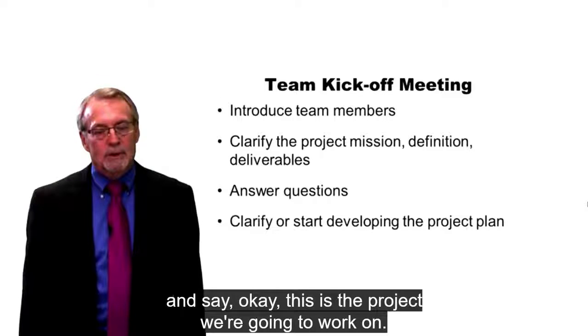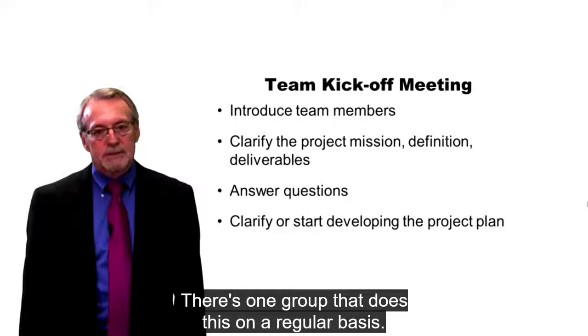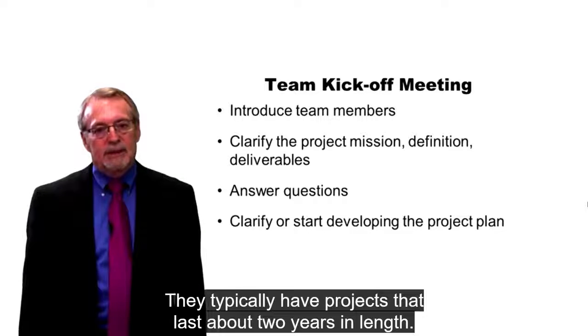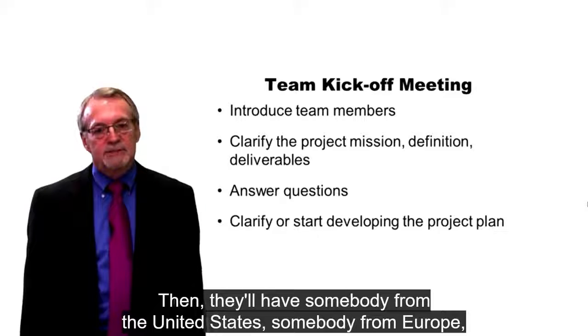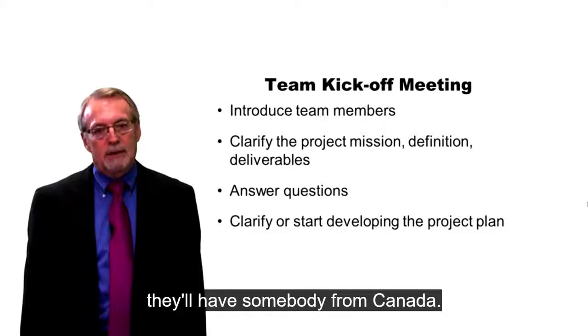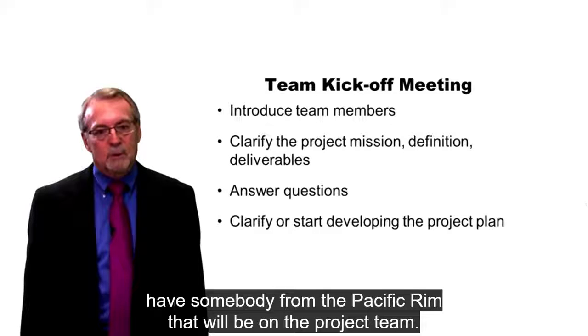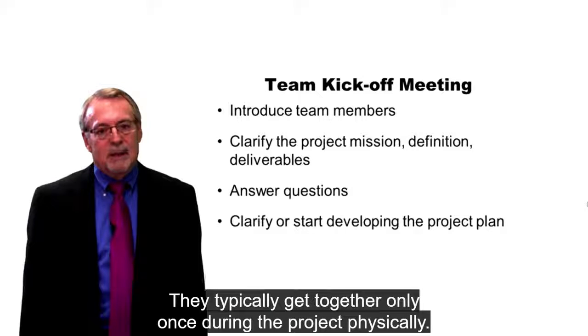We might have a kickoff meeting initially where we bring everybody together to say, okay, this is the project we're going to work on. There's one group that does this on a regular basis. They typically have projects that last about 2 years in length, and they'll have somebody from the United States, somebody from Europe, somebody from Canada, and somebody from the Pacific Rim on the project team. They typically get together only once during the project physically.